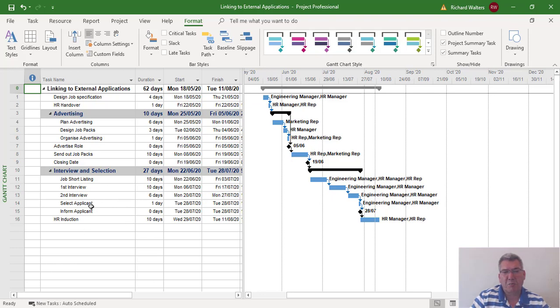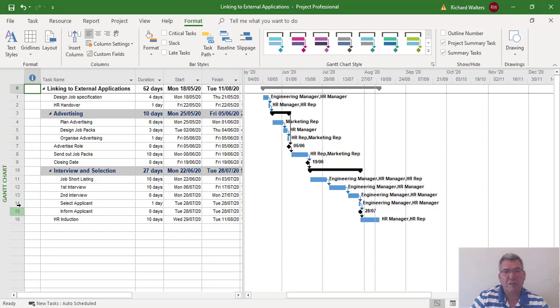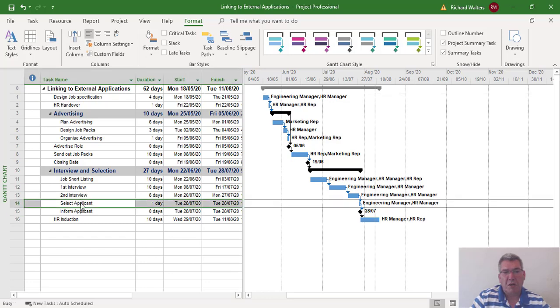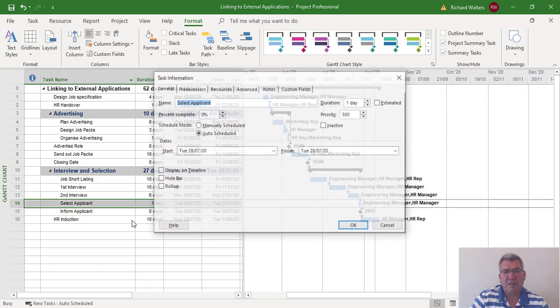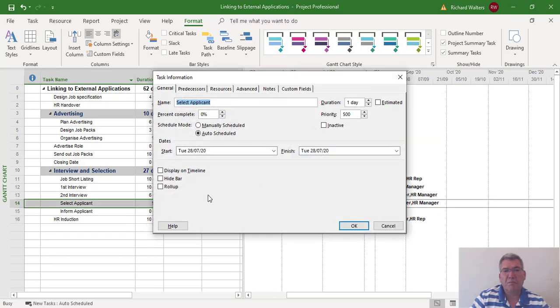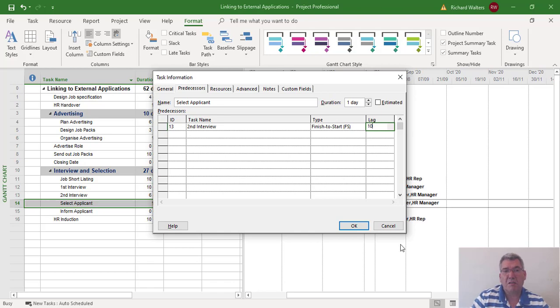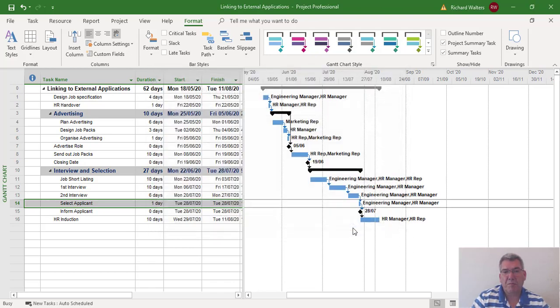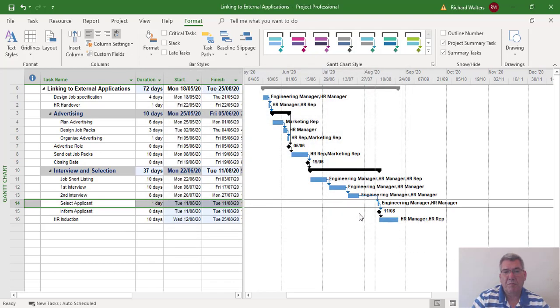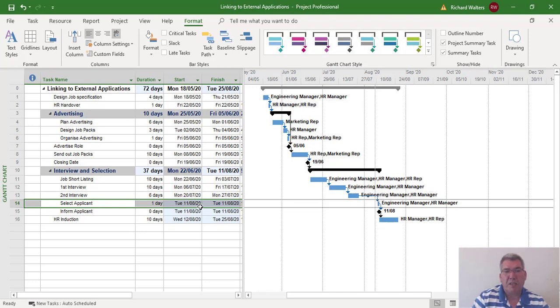I'm going to lag this task behind by 10 days, shifting it on 10 days. I could do this with a constraint or with lag and lead. I'm going to go to the predecessor and lag it by 10 days. Now it's shifted itself on and the dates have changed.